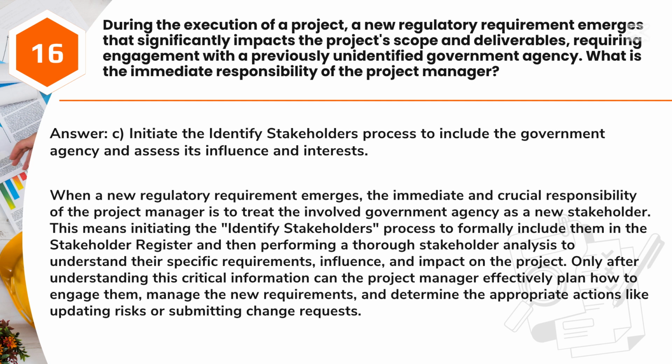This means initiating the Identify Stakeholders process to formally include them in the stakeholder register and then performing a thorough stakeholder analysis to understand their specific requirements, influence, and impact on the project. Only after understanding this critical information can the project manager effectively plan how to engage them, manage the new requirements, and determine the appropriate actions like updating risks or submitting change requests.